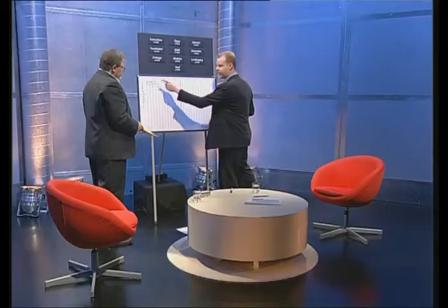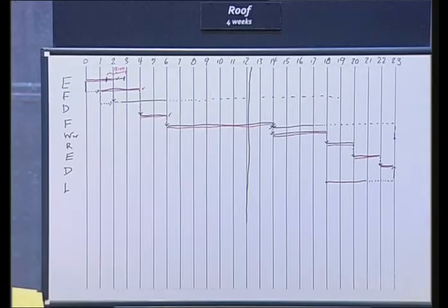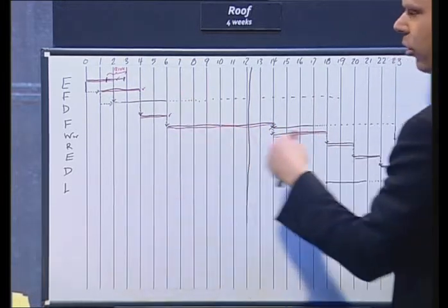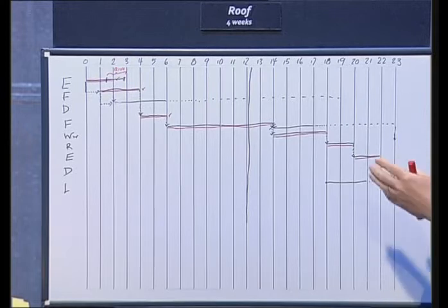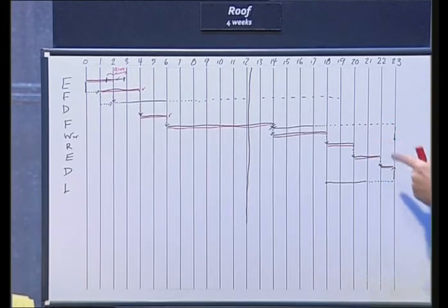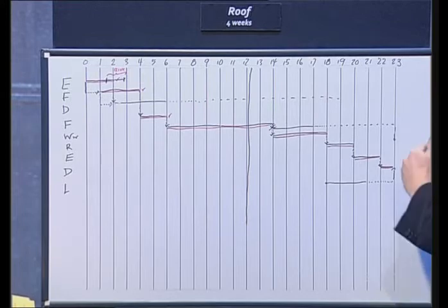Right. Can we just explain, in terms of concepts like project crashing, it's called many things, I understand, but can you just explain what it is and really what project managers maybe, or even site agents should be wary of? Yeah, project crashing or critical path crashing, as it's often referred to, is simply looking at the activities on the critical path. These are your priority activities driving your end date, primarily related to time. It's looking at them and seeing what additional resources you could apply to those activities, which could reduce the duration of delivery on those. The benefit is obviously you're then giving yourself more opportunity to finish early.